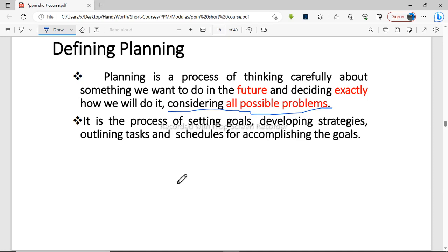Another thing can be a schedule, where you get to attach time to each activity. You say, okay, this house that we are building, we are building it in a given time frame. Maybe the time frame might be 3 months. And then you would say, in these 3 months, we are going to divide the work into 3 phases. So the first phase will simply be maybe laying of the foundation, and the laying of the foundation will take us 1 month. Okay, so that's a schedule. It's like a time within the framework. And then after this is done, the second phase will begin, and we will also give the second phase 1 month. Okay, all right, and so on and so forth.